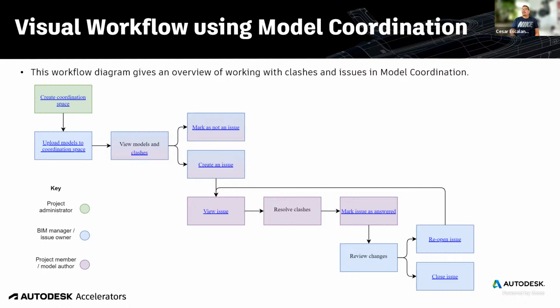So it's usually right after a major deliverable. There's this time where the project slows down a little bit because it's waiting to receive comments by the owner, comments by the agency, and usually during this time, when the team is not as busy in production, it probably makes sense to include some model coordination activities in conjunction with model integrity, which means purging the file, reviewing the warnings, reducing the number of incidents.